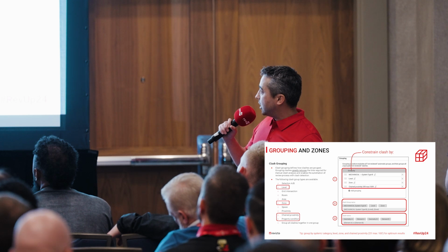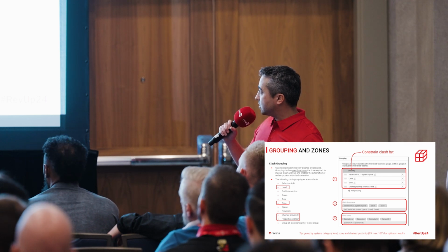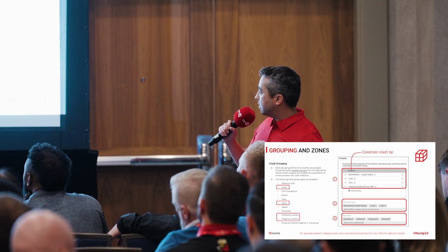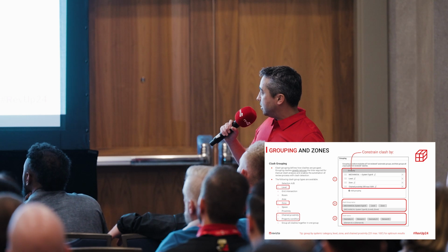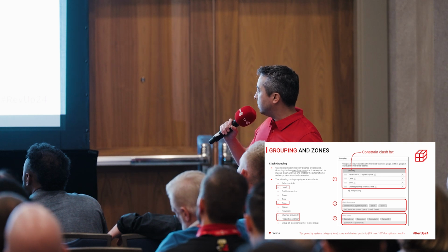It's going to look at it first by its system type. It's going to make sure it's looking at it just on that level that it's on. It's going to actually look at the zone it's in. And I'm going to set a proximity, a chain proximity of 25 feet. And then it's going to basically chain that up to a 100-foot max chain distance, which I'll show you in a bit what that looks like.